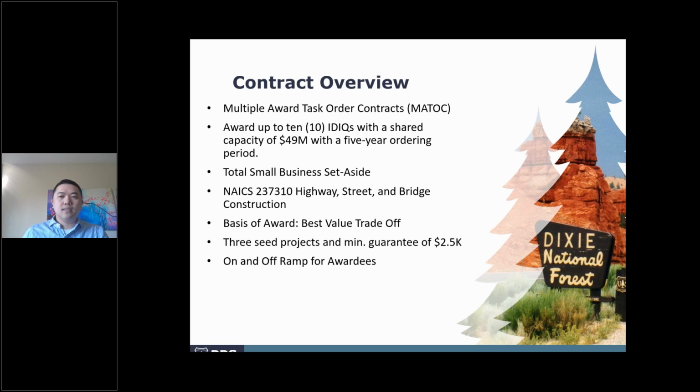But it's available as an option. We wouldn't do it at the very end, and it's not going to increase the 5-year limit. Even if you start at year 3, it's going to end at year 5, so it's not going to be a perpetual stew where it just keeps on expanding. It's going to be 5 years, and then we're on to the next, 2.0, as I mentioned.